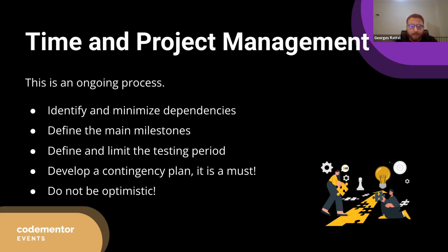So when you identify these dependencies, you make sure to handle them before you start, or you make sure that the client is 100% aware that at this date, if these details are not available, then a delay will happen in the project. It's an inevitable thing, and there's nothing you can do to avoid this. You have to address it from day one. Same thing for anything else, as simple as a Facebook login integration, Google integration, whatever it is.